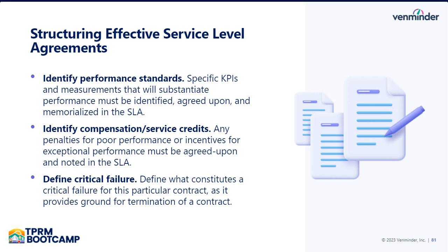Define critical failure. Define what constitutes a critical failure for this particular contract. A critical failure provides grounds for termination of a contract. The best practice: effective SLAs define critical failure for that particular contract. Stating such in the contract enables termination based on specific events happening.